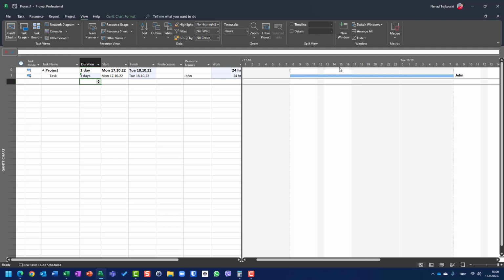So this is 1 regular day, and the rest of 16 hours is done outside of the regular day, which is from 8 to 12 and from 1 to 5. So he worked 8 hours during regular time, which came to 1 day at the project level, but he works on the task level 3 days. Why? 24 hours from 8 to 7 the next day.